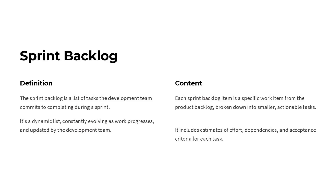The sprint backlog is a list of tasks the development team commits to completing during a sprint. It's a dynamic list that's constantly evolving as work progresses, updated by the development team. Each sprint backlog item is a specific work item from the product backlog broken down into smaller, actionable tasks. The sprint backlog includes estimates of effort, dependencies, and acceptance criteria for each task.